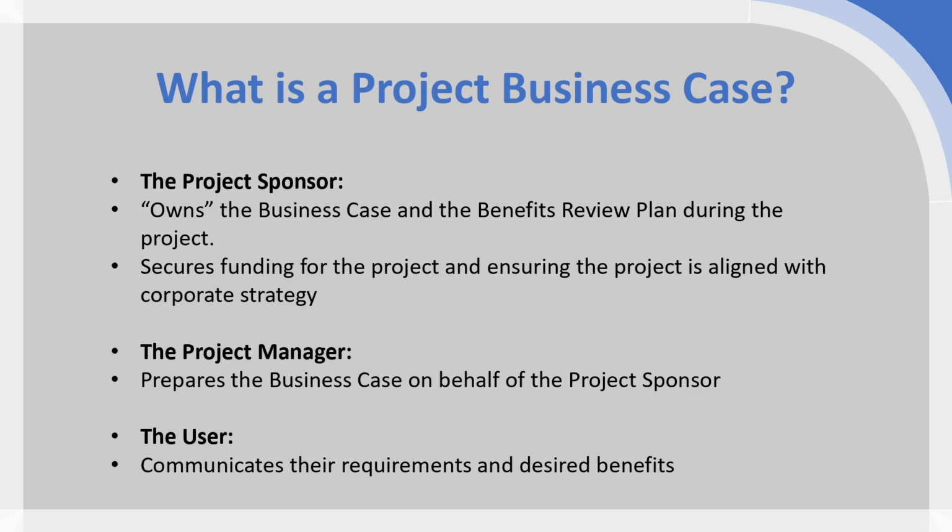They wouldn't necessarily write it, but they're ultimately responsible for the business case, while the person who's preparing and writing the business case would typically be the project manager. So the project manager is the person who's managing the day-to-day reality of the project. They're the person who prepares the business case. They're the person who would be responsible for preparing the various plans in the second stage of the project lifecycle. So the risk management plan, the scheduling plan, the resource management plan, the quality plan. So they would be the day-to-day person responsible for the project, and they would prepare the business case.